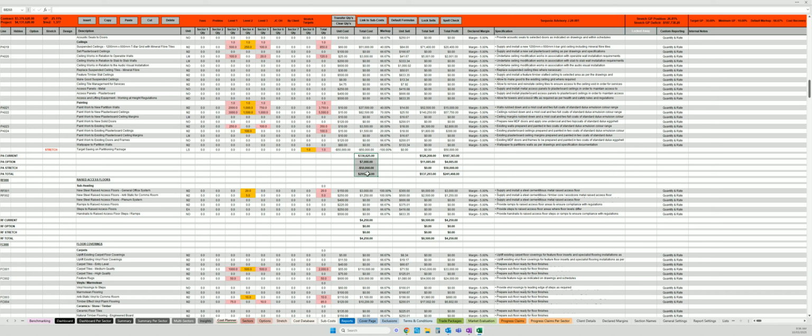You can see the analysis is completed, updated, at the bottom of the section. So I have $338,000 of cost above the line, $526,000 of sell above the line. I have $7,000 of cost options. I have $50,000 of cost stretch targets. And if all of those eventuated, the package would be $295,000. You can also see with that $50,000 saving, my GP percentage is now 26.81%. And my GP deficit is $107,000.